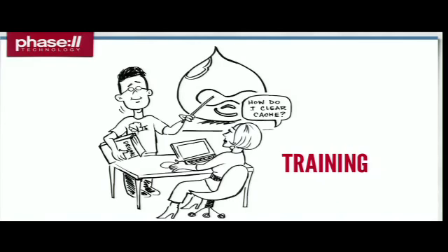It doesn't matter at the end of the day if people aren't fundamentally comfortable with it well before you go live. So if you start that training process and you even integrate it in as sort of testing training, it's okay to mix those two on the content side. If you're dealing with containers, it's okay to do iterative reviews very early on and just tell them, hey, this is me teaching you how to use the system and you telling me what's wrong with the system, and we'll just mix it all together, and we'll just make tickets as we go.